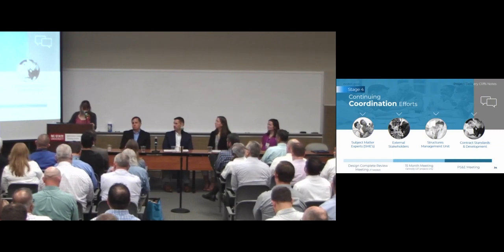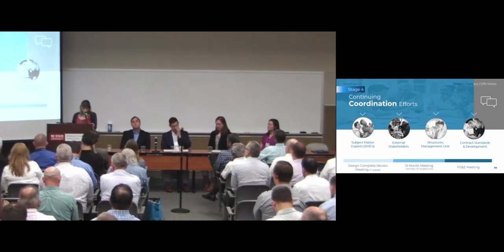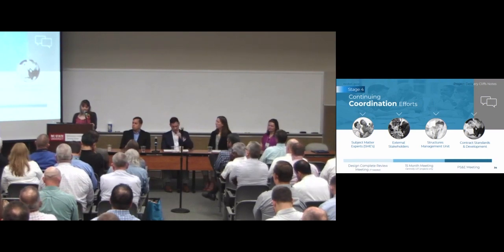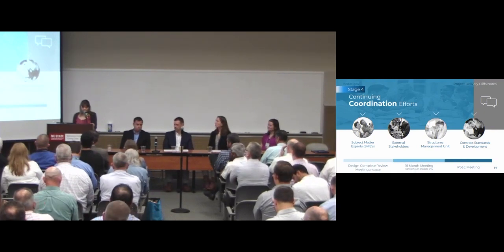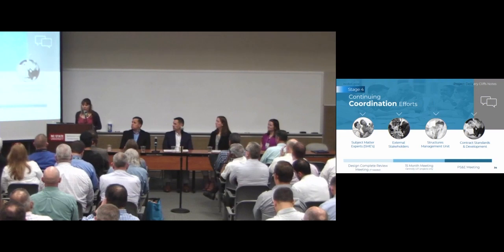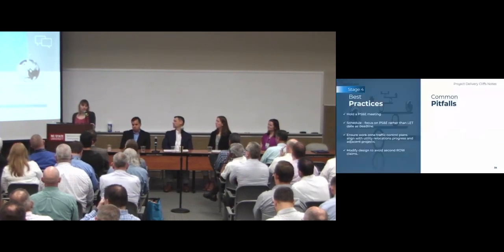And then we've got the PS&E meeting. This is highly encouraged because this meeting is to help review and ensure that we have a complete package ready to go. Making sure that all comments have been addressed, any outstanding issues have been mitigated, discussing what is ready to go in the let prep folder, and what action items are still needed to make sure that we're ready. Who is putting in the let prep folder? Who's putting what deliverables in the let prep folder is also important to know. We also have our right-of-way and utility coordination meetings that are often continuing on in this stage.